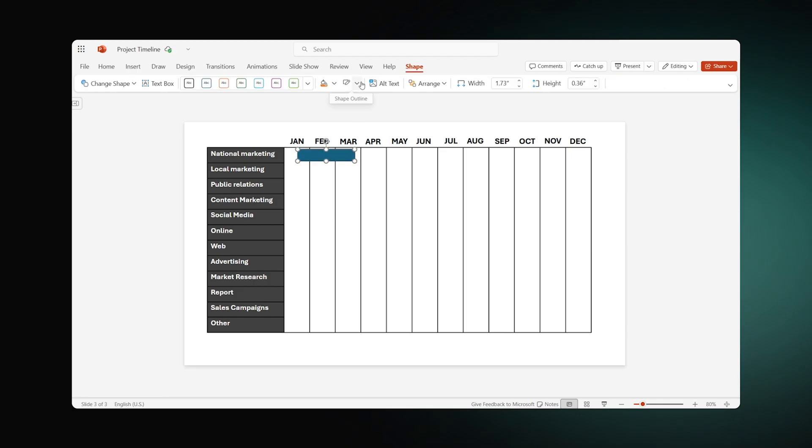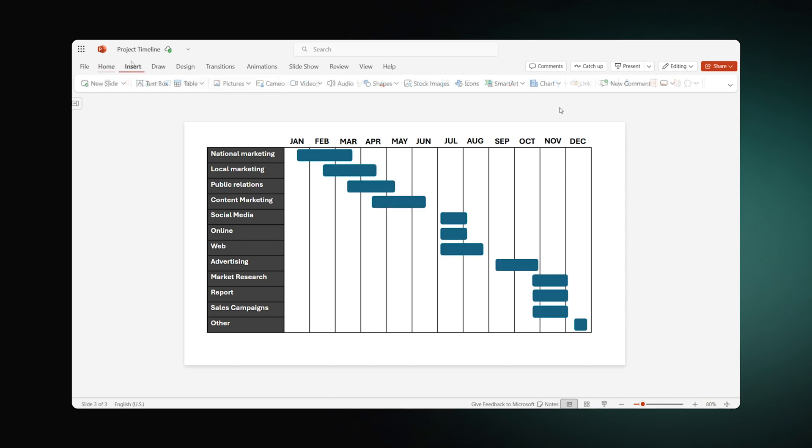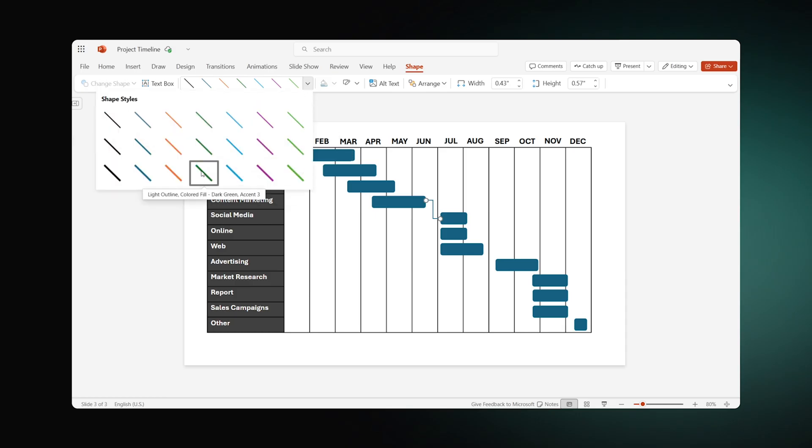These bars will represent the start and end dates and duration of the tasks. Besides, you can take the same steps to show dependencies between the tasks. Choose the connector you like, draw links where needed, and change the style of the arrows.